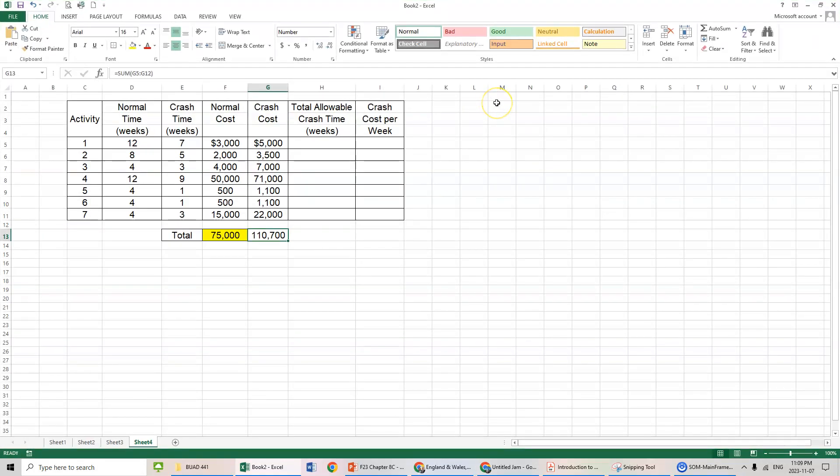Let's go back to Excel. We're going to get those numbers. The total allowable crash time is simply the difference between the normal time and the crash time. Basically, we can crash Activity 1 by 5 weeks. The bare minimum, we can only crash down to 7 weeks. We can't shorten it anymore. Activity 7 can only be shortened by one week. There's a maximum time or minimum time that each activity has to take. The crash cost per week is looking at the difference between the crash cost and the total normal cost divided by the total allowable time. That's $400. We can drag that down and we get the crash cost per week.